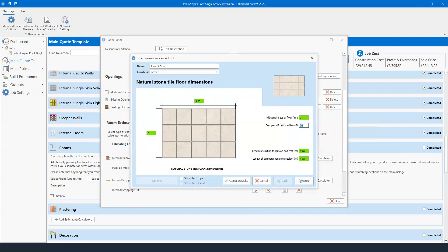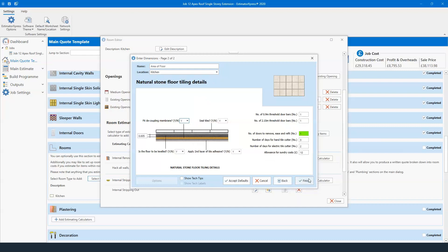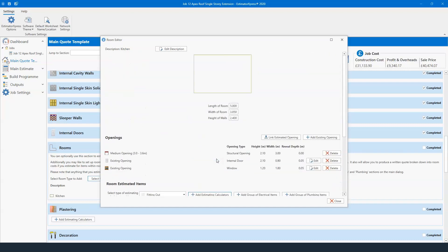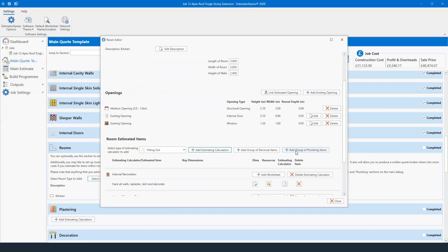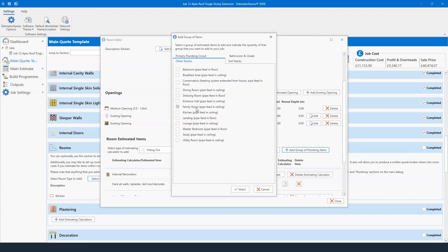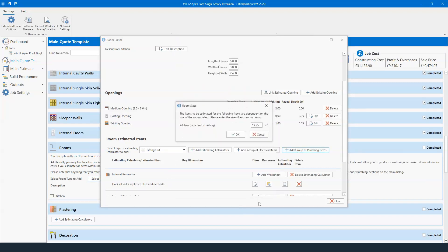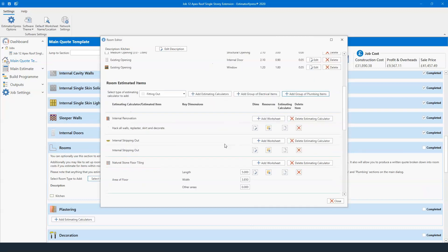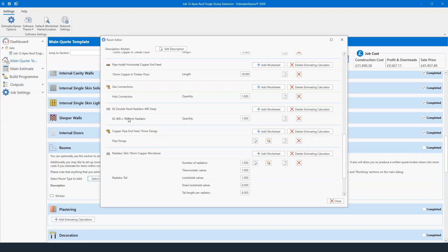Once happy — brand new plaster shell, not decorated yet, no kitchen in yet — you can start fitting out. A natural stone floor tile: enter the room length and width, cost per square meter. If a client says they'll supply the tile and you just fit it, zero out that box and it calculates just the fitting cost. You've also got groups of electrical and plumbing items. For plumbing, select the room — Kitchen — and the software calculates the square meterage (19.25 square meters) and tells you what size radiator you need to hit the right BTU values, using SAP report calculations built into the software.